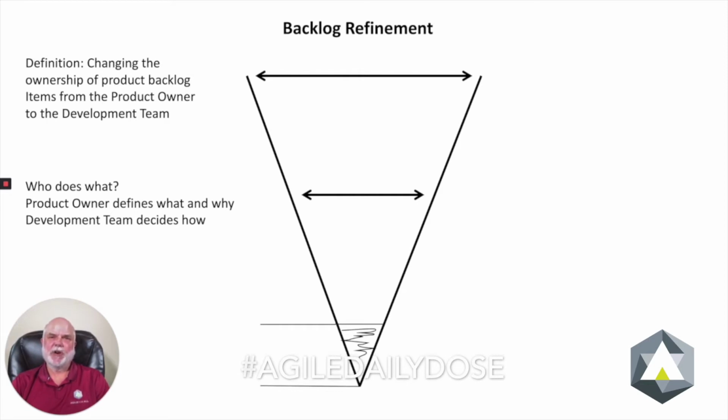Now, my fancy drawing on the page. Well, the top line represents a backlog item that's big and maybe not very well defined. And of course, those start out coming from the product owner. And they're generally trying to look 2 sprints ahead. So backlog refinement is always looking 2 sprints into the future. So you're working on 1 sprint, and the next 2 you're doing backlog refinement.